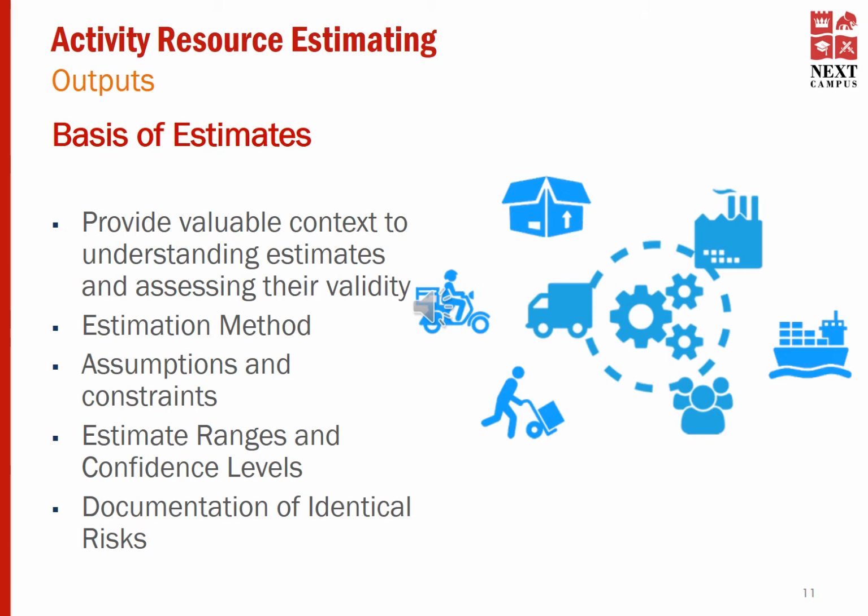It should be a clear document so that those involved in project management will be able to understand as well as assess the estimate. It will make it easier for those in project management to determine the cost, funding options, pricing basics, cost risk, allowances, opportunities, and many others using standard practices. The basis of estimates requires attachments which include estimate deliverable checklist, reference documents, benchmarking report, risk analysis, and reconciliation reports, etc.